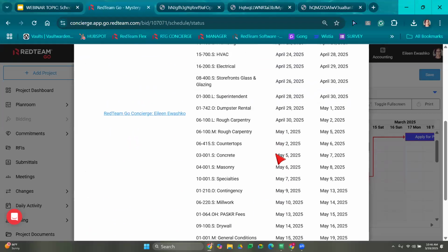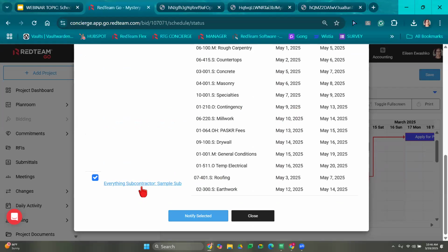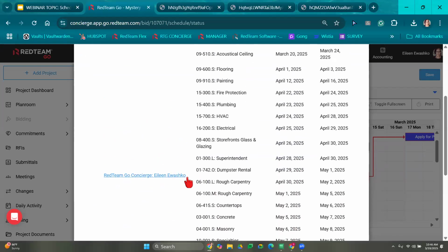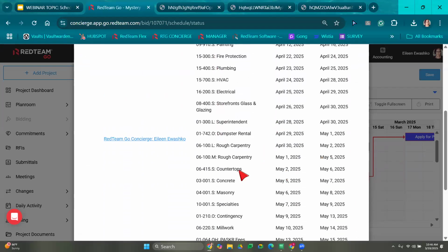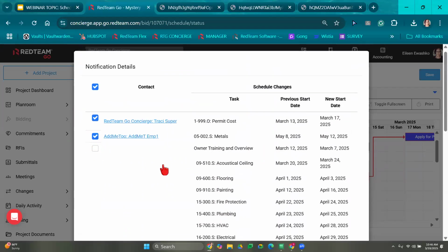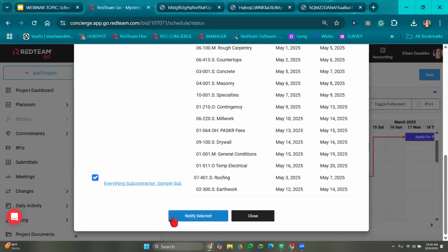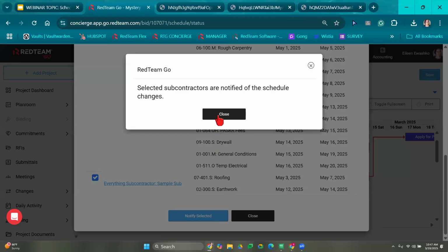All it's going to do is notify them just like this. So every subcontractor is going to receive an email that says roofing, these are your new dates, your start and end date, earthwork, your start and end date. Whereas myself, Eileen, because I have all of these things assigned to me, it's going to show me all of my new start and end dates. I don't have to choose to inform myself. When we're ready, we'll select Notify Selected. And now RedTeam sent out an email. It's just an email. It's not a copy of the schedule.